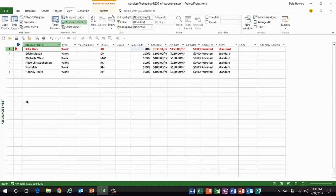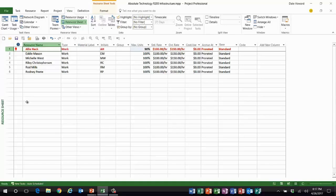She's over-allocated because she is assigned at a bunch of tasks at 100% units. So is there any easy way that I can change the units value for Allie Heck without going to a whole lot of work?